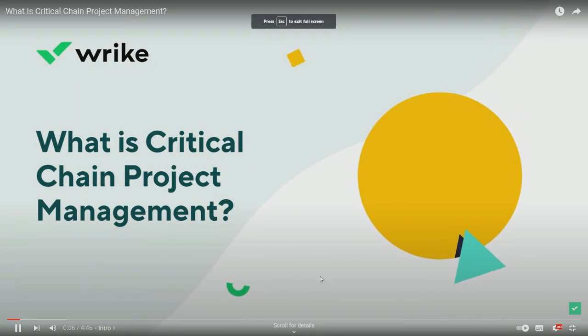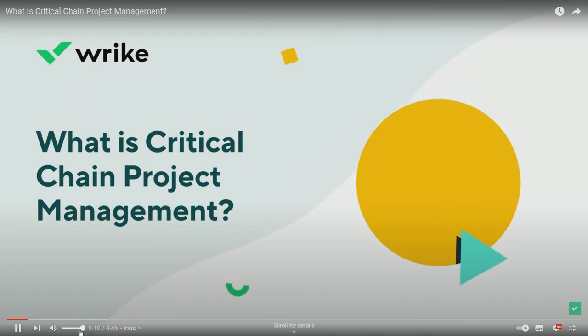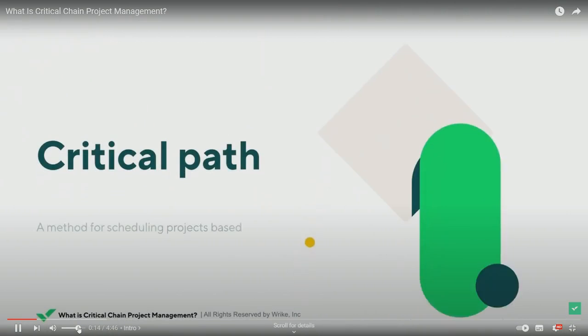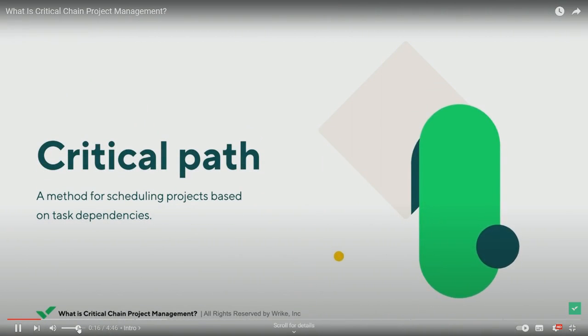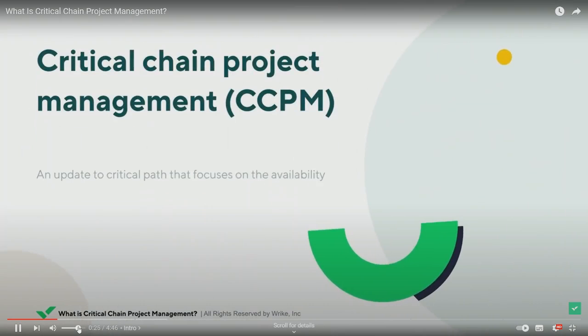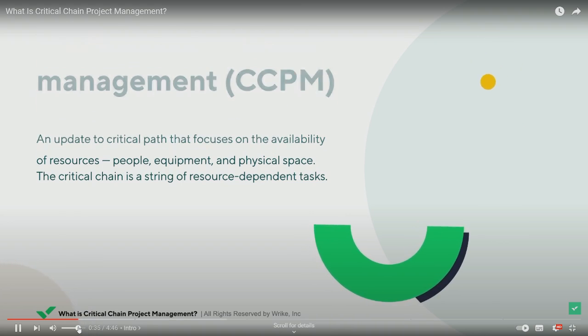What is critical chain project management? To explain CCPM, we first need to understand the critical path method. Critical path is a method for scheduling projects based on task dependencies. If you want to learn more, watch the video linked in the description. Critical chain project management is an update to critical path that focuses on the availability of resources, people, equipment, and physical space. The critical chain is a string of resource-dependent tasks.